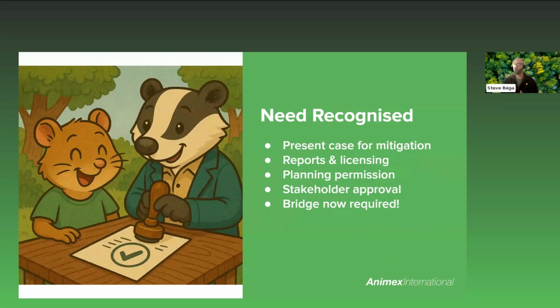So if you've identified that a bridge is needed, you need to prepare evidence to support your case. Now, this usually takes the form of reports and supporting documentation within the UK in particular, which is obviously a lot of the focus of our talk today. This may involve Natural England and Natural Resources Wales, local planning authorities and/or transport or land agencies, again, all depending on the nature of your project.